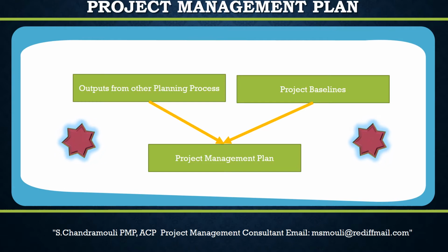No formal process is required at that time. But, once it is baselined, it may only be changed through the Perform Integrated Change Control process. Consequently, change requests will be generated and decided upon whenever a change is requested. This results in a project management plan that is progressively elaborated by controlled and approved updates, extending through project closure.